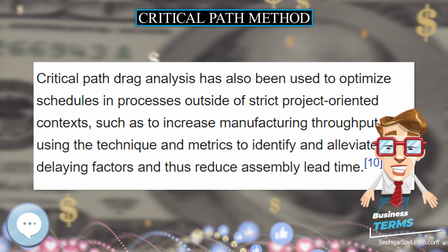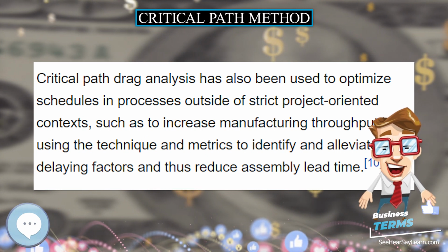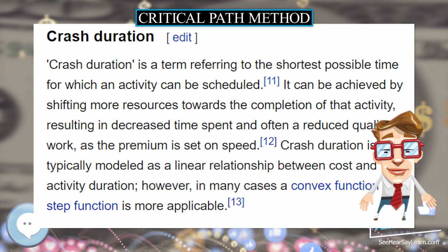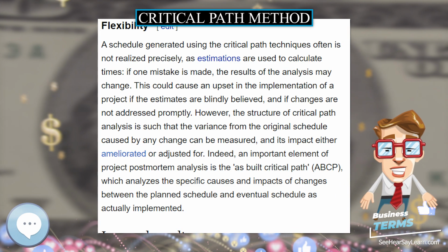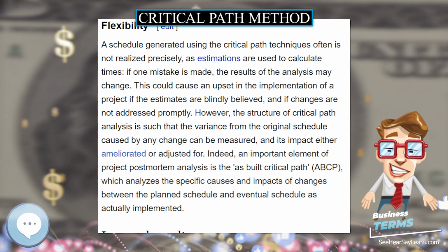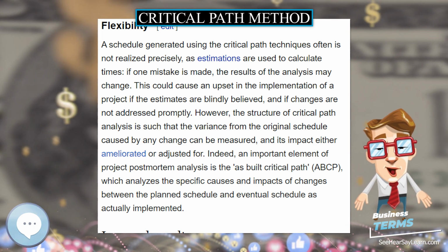Indeed, an important element of project post-mortem analysis is the as-built critical path, ABCP, which analyzes the specific causes and impacts of changes between the planned schedule and eventual schedule as actually implemented.